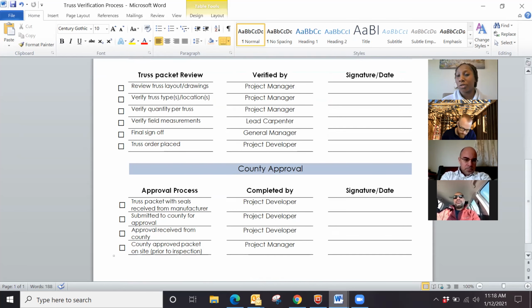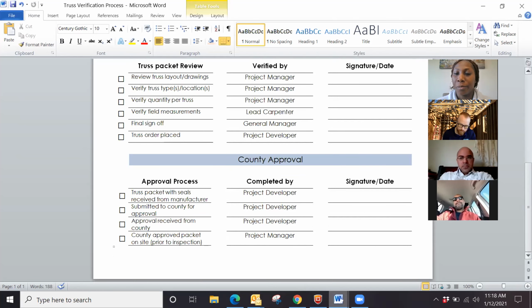So you know your construction schedule, you know when you need to have the trusses on site, you know what the turnaround time for trusses is, which is usually 2 to 3 weeks. We don't want the project to be stalled, so you know the deadline when you absolutely have to get these things to the PDs by. So you'd be working closely with them to do that. Questions so far?